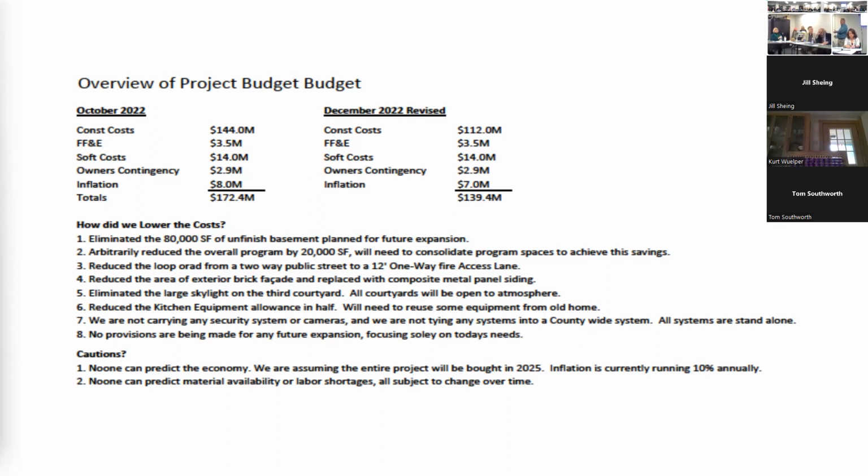I can share with you after the entire estimate that was done by Harvey. So we're taking projects of comparable size and comparable complexity, carrying what those costs were for the mechanical systems into this. Now, it could be fossil fuel, it could be geothermal, it could be a combination of different things. We're not there yet. Okay, well, there's a huge difference in capital costs. For example, if you're gonna go with oil heat versus geothermal, geothermal will probably save you money in the long run on your operating costs, but it's gonna be much higher capital cost. We're talking capital costs today, and that's what I'm trying to figure out. There's a line for geothermal on here, but it says zero. There's a line for solar, it says zero.